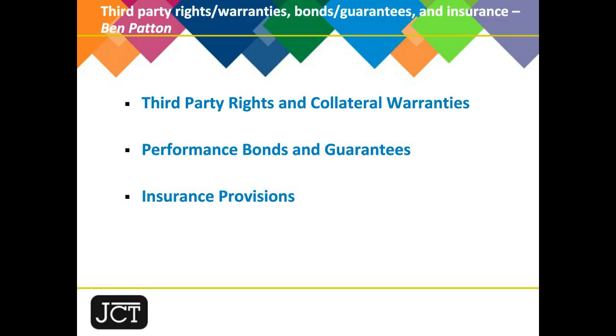Clause 6.12 contains all of the provisions relating to providing evidence of insurance. So if a party reasonably requires evidence, the other party must provide it within 7 days, failing which the party requesting the evidence is entitled to assume that there's been a default in insuring.